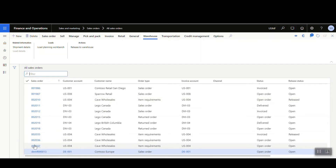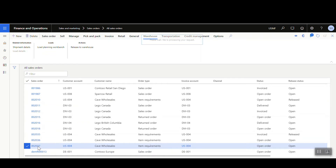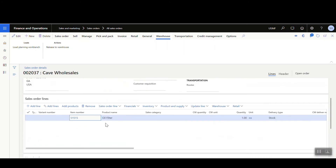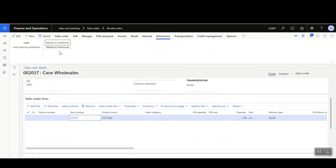At the bottom of the sales order list, we now have an item requirement sales order for item 51515, quantity one. Importantly, the same project will reuse this same sales order over and over — if I go back and add other item requirements, they'll be added to this same sales order, which is continually used for this particular project. You could release to warehouse from here, but I'm going to do it through the project module instead.